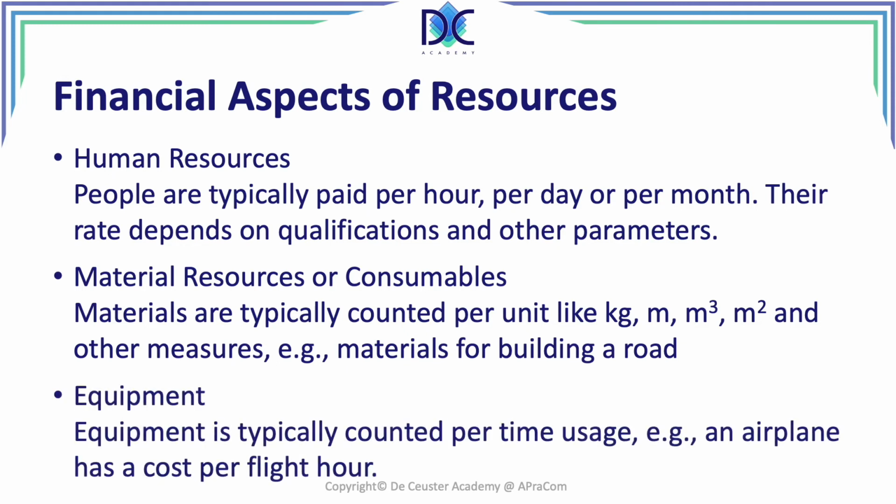Equipment is typically counted per usage. For example, an airplane has a specific cost per flight hour. You may rent some device for a certain cost per day.